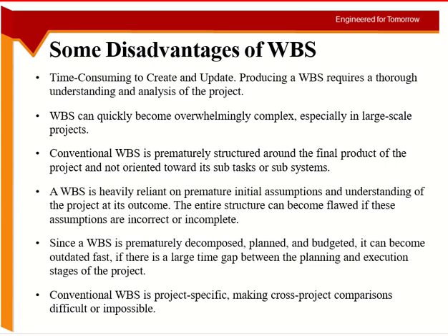But maybe you are missing that the soil is very weak, so I need to do some filling or remove the soil or reclaim the land or something. So you are looking at the regular tasks which are part of the project, but you are not looking at the site conditions or some important thing which you need to do the actual task of the project. This is the problem with the conventional approach.